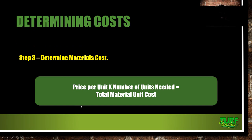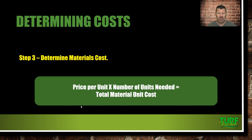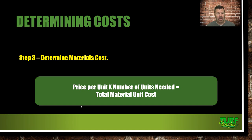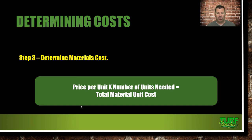To determine material costs: price per unit times the number of units needed. For example with sod — how many rolls or squares per pallet, what is the cost per pallet, and how long does it take to install? If you've put out a lot of sod, you know those numbers. Early morning the sod comes off fast, but as the day goes on, sod laying gets a little slower.